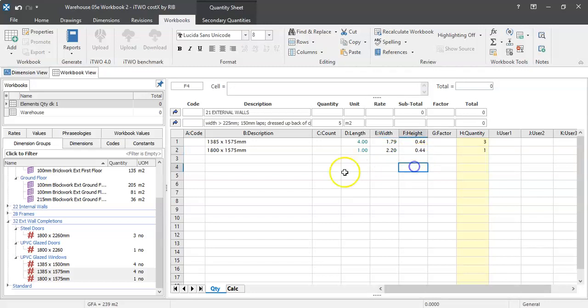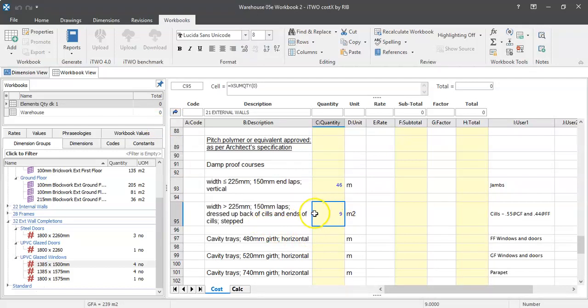So there are the upper floor windows, and the windows on the ground floor, just those 4 there. Drag and drop them over. Click update. As you can see, this can get a little bit complicated when you start getting into the details, 1.785, but you can do this. And what did I say on the bottom floor? Because it's got a thicker inner leaf of 215, 0.55. So I'm just doing what you did with FICRA. Again, if you wanted to show that in decimal places, it won't make a difference. The total area of my DPC there is 9 meters squared.